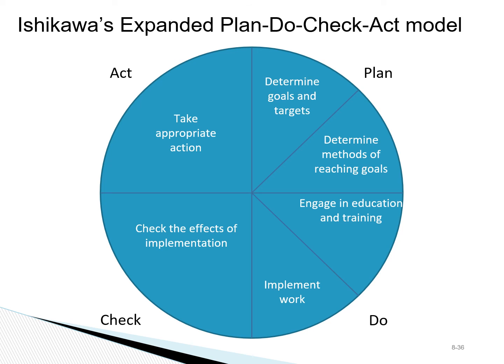Lastly, when we identify the areas that need to be improved, we can use the model of plan, do, check, act to implement improvements. Essentially, we determine what needs to be improved, we implement the changes, then we check the effects of the change in the outcomes, and we adjust as needed.